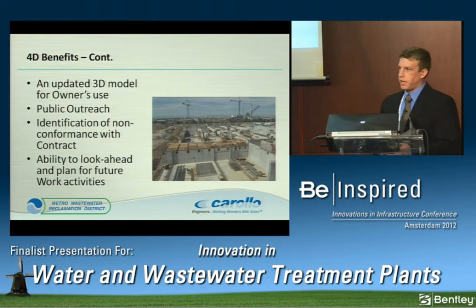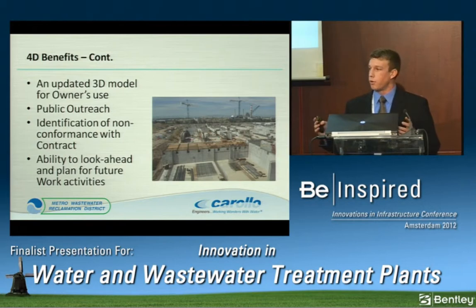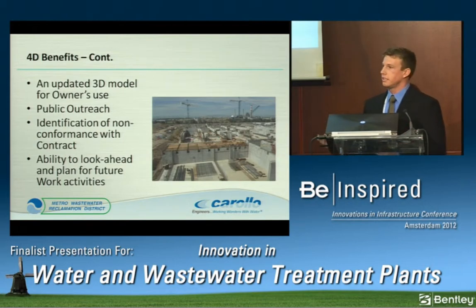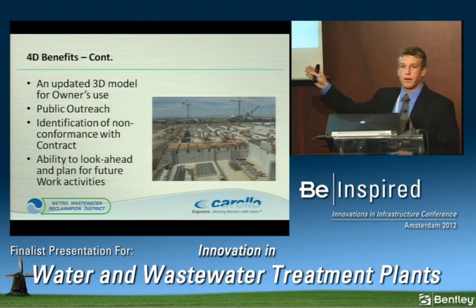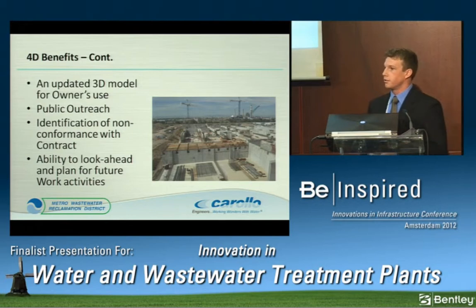Something we didn't anticipate, and it's actually worked out great, is the public outreach. The public is able to see these visualizations. A board of directors, I've never been in a board of directors meeting where they said, I'd like to see the 12,143 activity schedule. They're not interested in that, but they do like to know what's going on, where they are in the project. So this allows us to easily show them in about 5 minutes the anticipated schedule for the project.